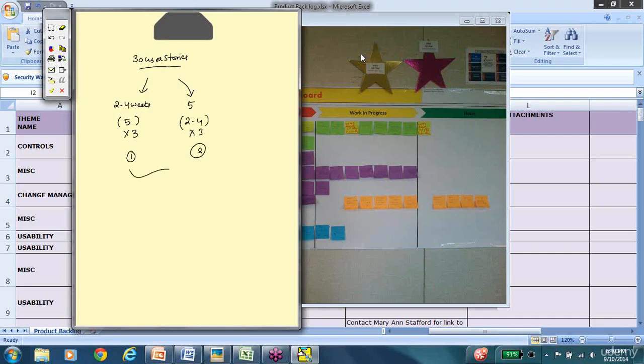Actually, it is neither. According to the Agile Manifesto, you will only be successful in an Agile world if you keep the team size small, because the communication is not going to be as smooth if you have a larger team. On the other hand, if you are moving to a 2 to 6 weeks timeline, so let's say the project's 10 requirements is going to take you 6 weeks. So if you multiply that by 3, you're again looking at 4.5 or 5 months. That also is against the Agile principle. So neither of them is a viable solution.